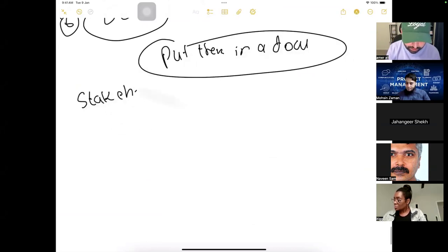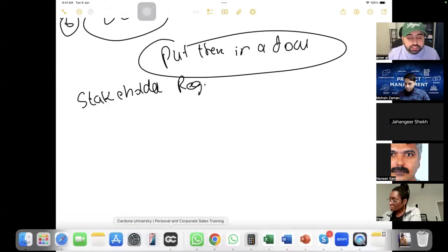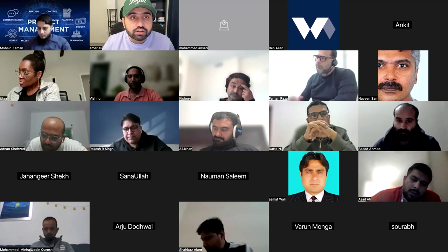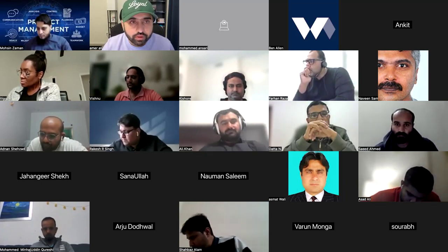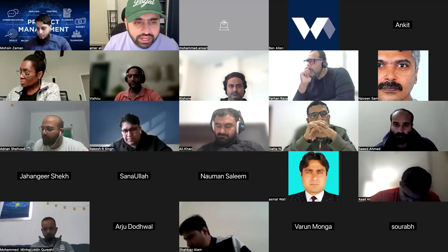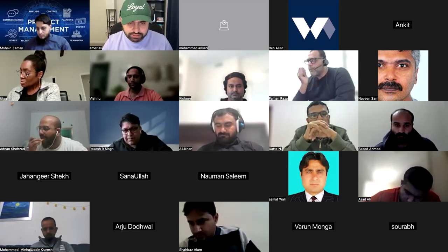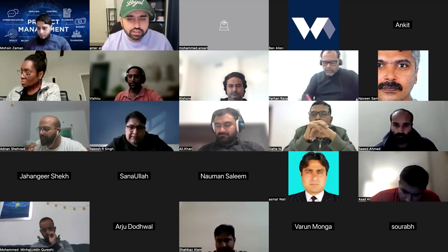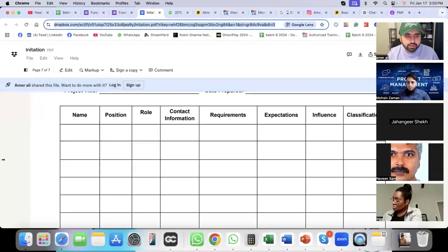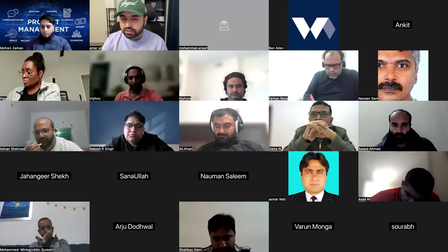Now, what are the content of stakeholder register? Content of stakeholder register is who the stakeholder is, why we need him, what is needed from him. All the content in as much detail as we can put at this stage. Who the stakeholder is, what is his position, what is his role, what do we need from him, right? His name, his position, his role. First, we put this in. This will be updated as we move forward.